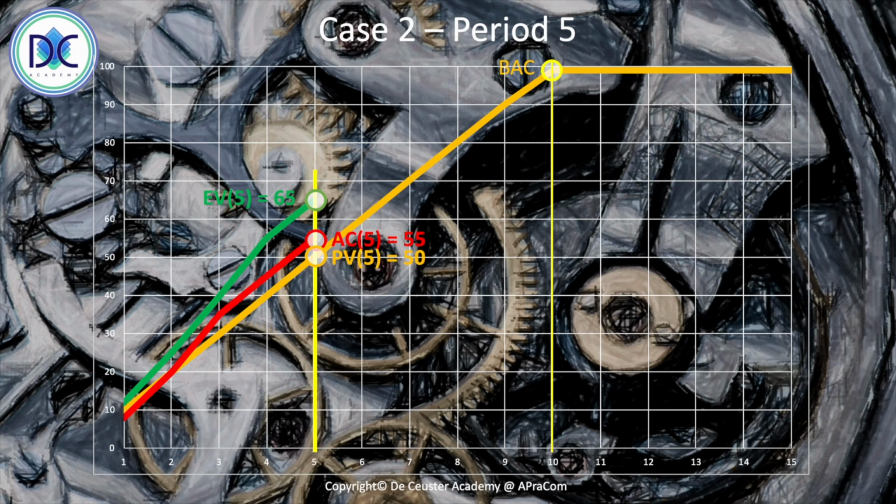which means that we may have some concerns about the quality. Are we doing everything the way it should be? This is one of the things we have to wonder here. Can it be so good? We don't know. We don't expect this. The same goes for performing financially better than we estimated. It may also be an indication that we are going too fast, we are not doing everything, and it may lead to quality problems and issues.